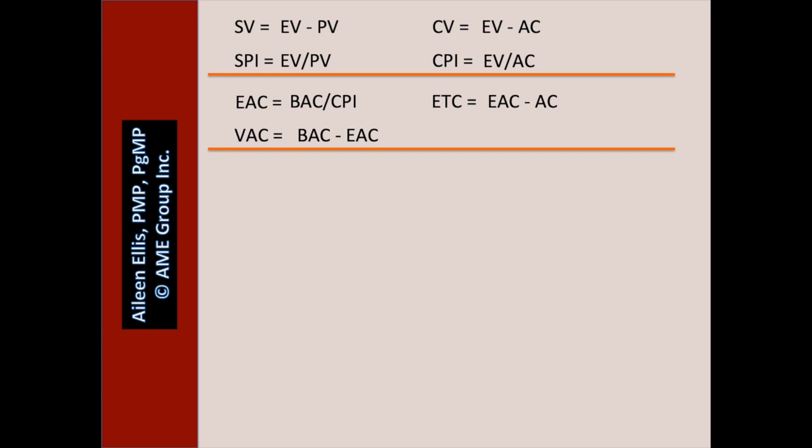The last idea for the exam related to earned value as far as a formula is TCPI. Common sense, I think of TCPI equals work remaining divided by money remaining. Now, I probably wouldn't write that down when I'm doing my data dump for the exam, but it helps us here. They could ask for the TCPI two different ways.